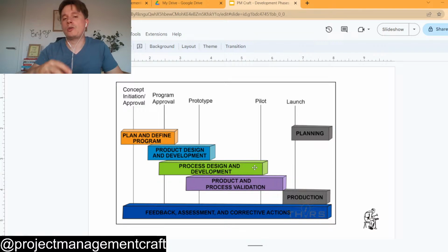Because when I'm talking about project flow, you start to have the idea about the critical path. As I mentioned, if you're developing a product, qualification is more or less always part of the critical path. And then you ask, okay, but what do I need to execute the qualification? Then you can start to connect the dots back. But if you do not see this, it will get very difficult.